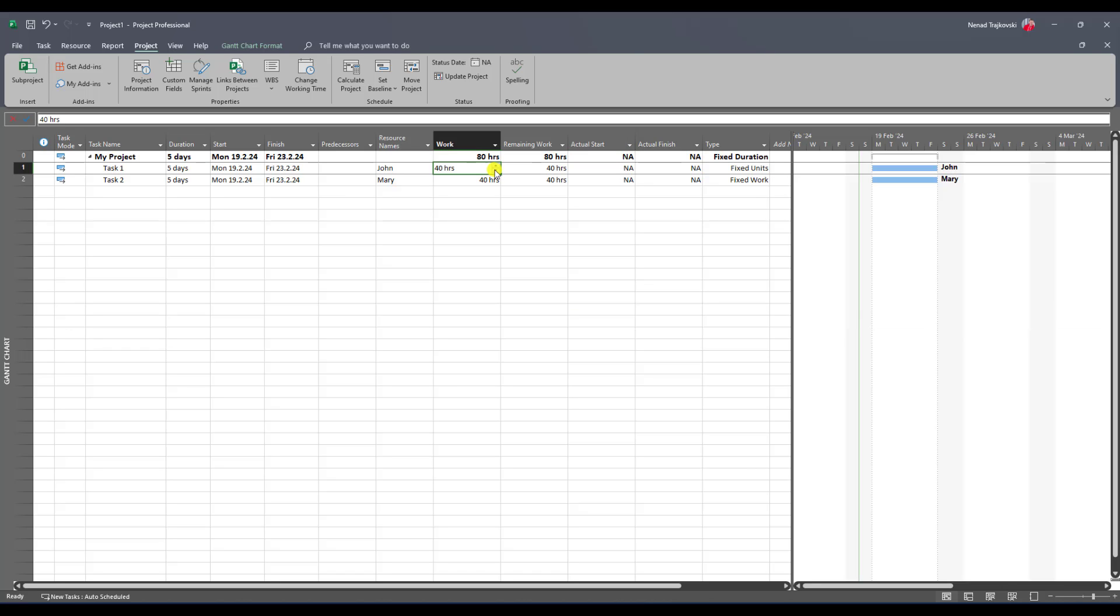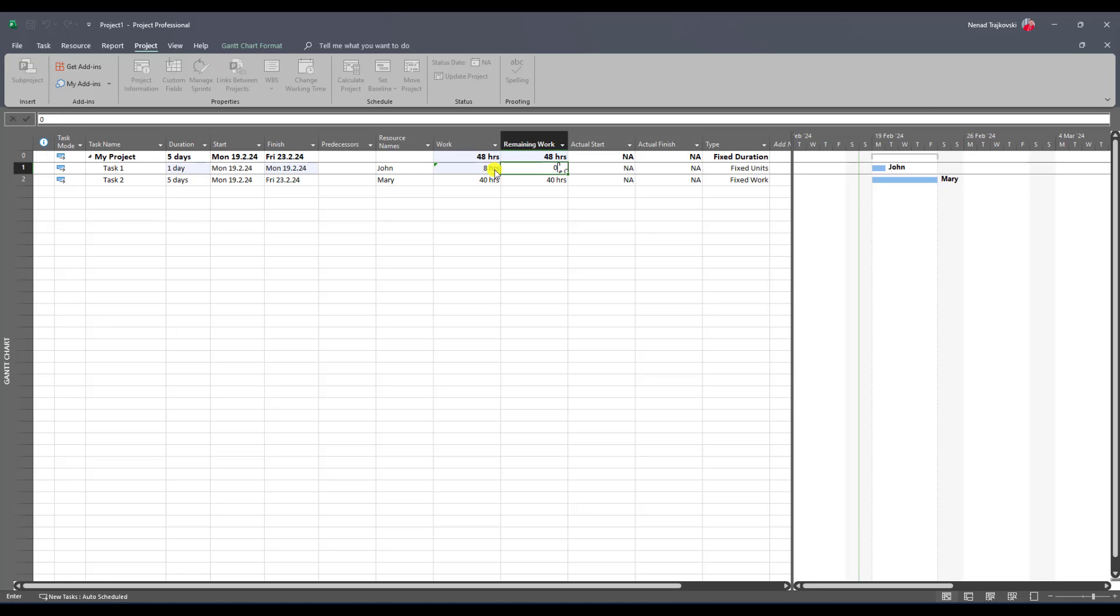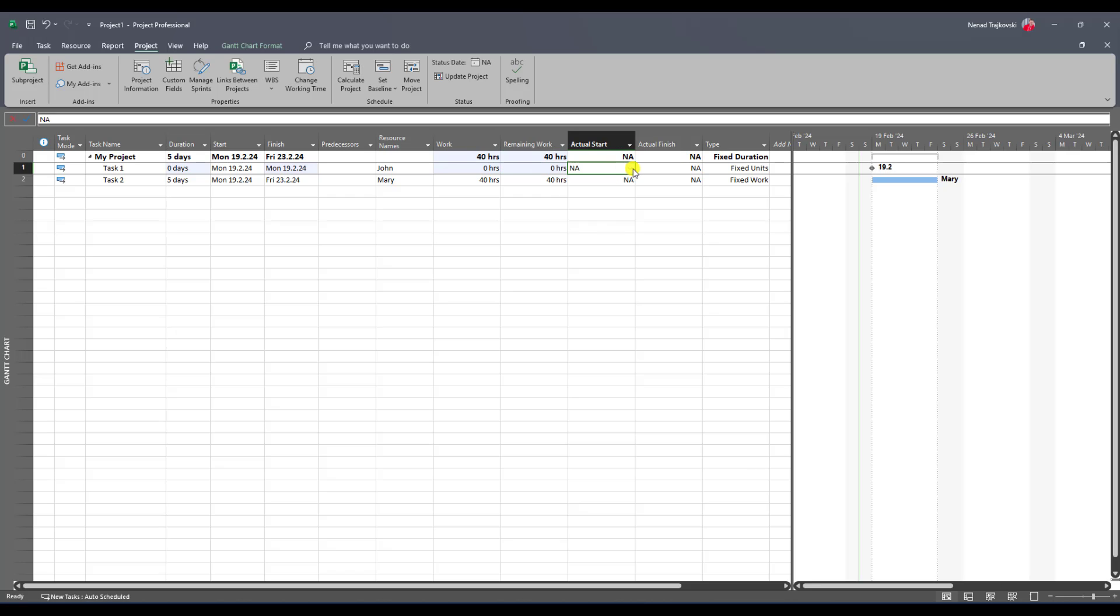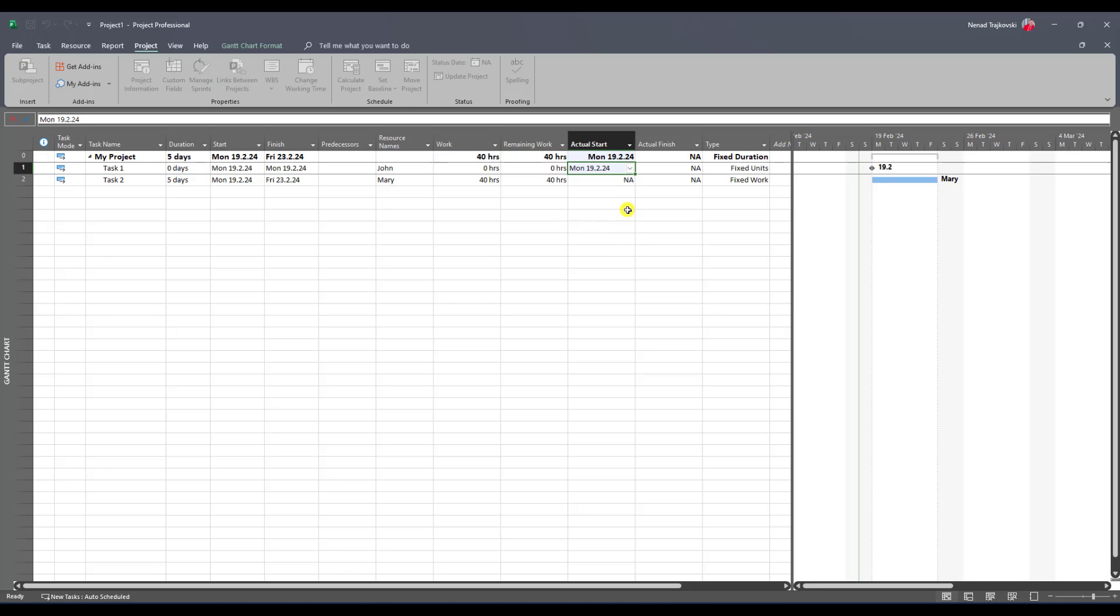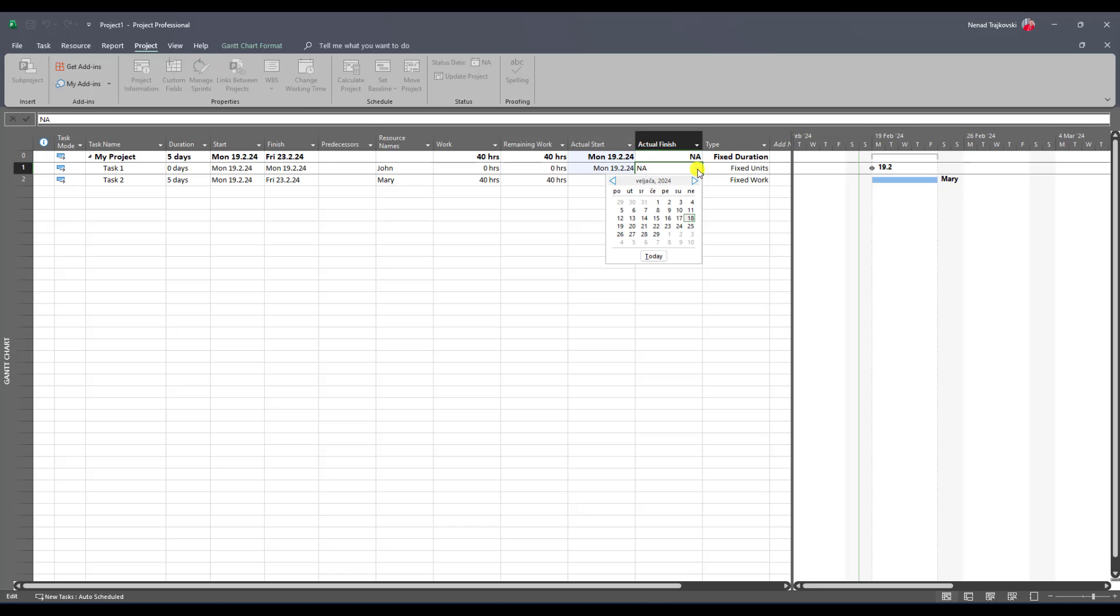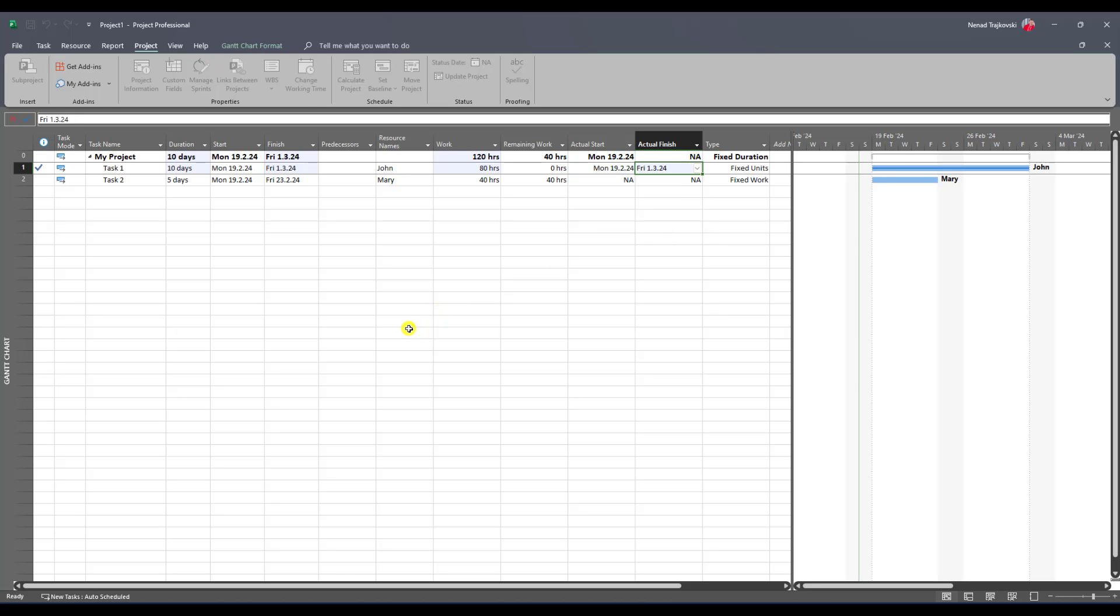But my task started on the 19th and it was finished on 1st of March. So I will put it here 19th, and I will put here 1st of March as finish date. Now you will see that automatically work will be 80 hours and duration will be 10 days.